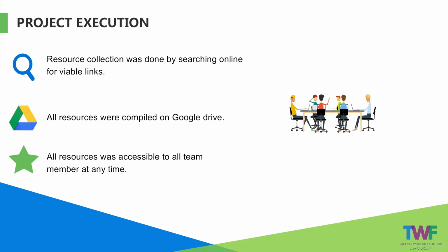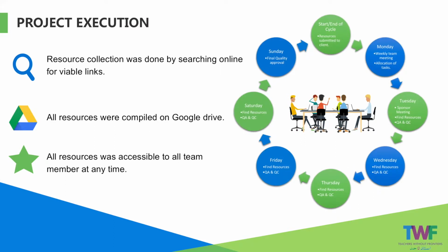The project was broken down into individual activities using a work breakdown structure. Each activity was defined, prioritized, and sequenced. The project deliverables had to be submitted to the client on a weekly basis. The student learning outcomes were broken down into 7 batches, with each given a week's time to complete. A weekly cycle of work was established, and a typical cycle is illustrated here.